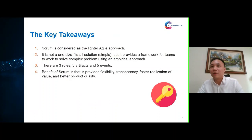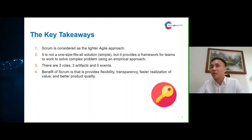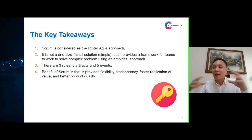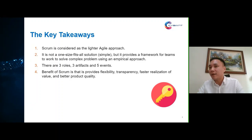There are four key takeaways. First, scrum is considered the lighter agile approach — easier to adopt, understand, and practice. Second, it is not a one-size-fits-all solution, but provides a framework for teams to solve complex problems using an empirical approach — making decisions based on what is observed and based on experience. Third, there are three roles, three artifacts, and five events — knowing this, you should now have a picture in mind of how scrum works. Fourth, the benefits of scrum include flexibility, transparency, faster realization of value, and better product quality.